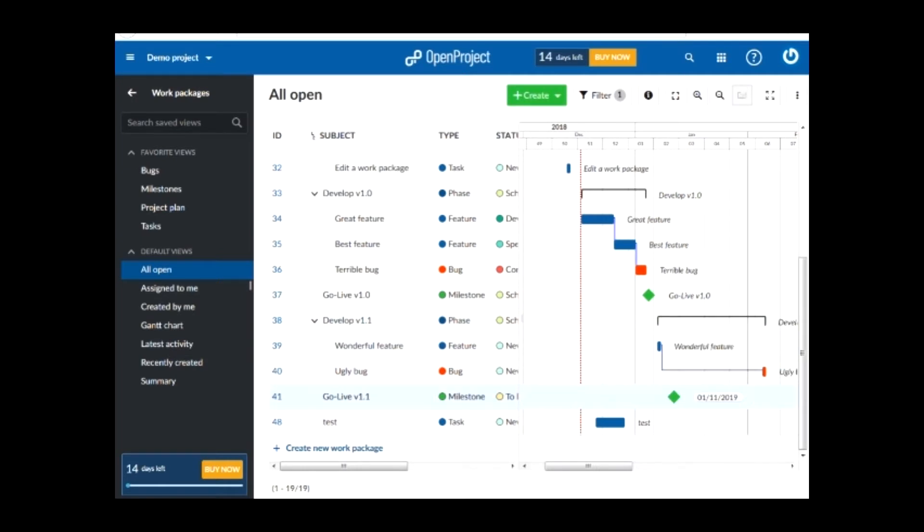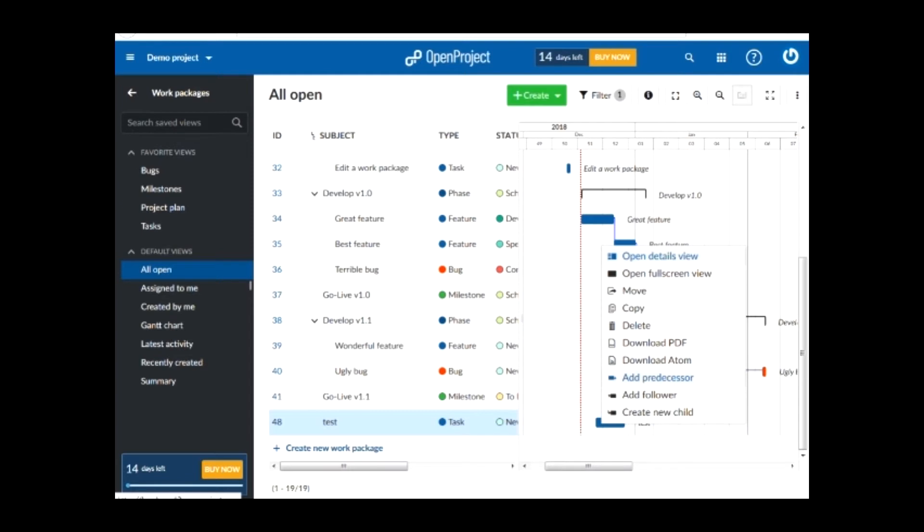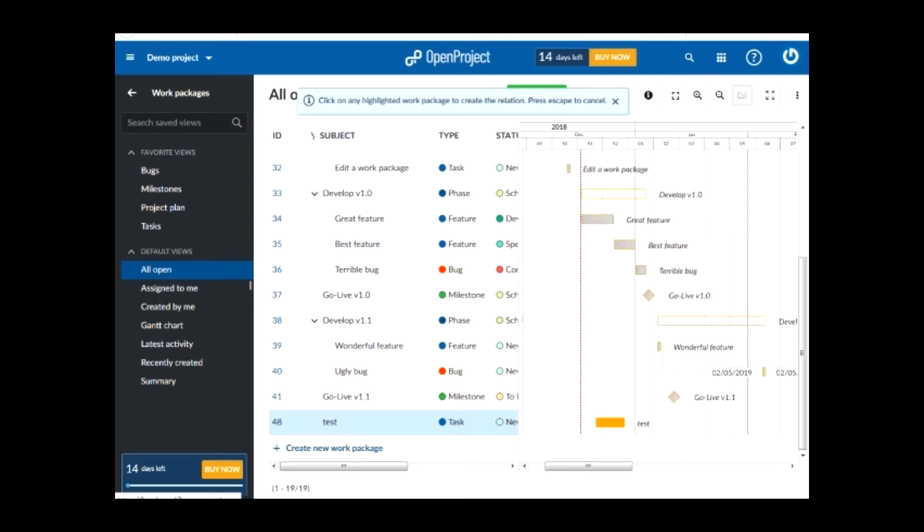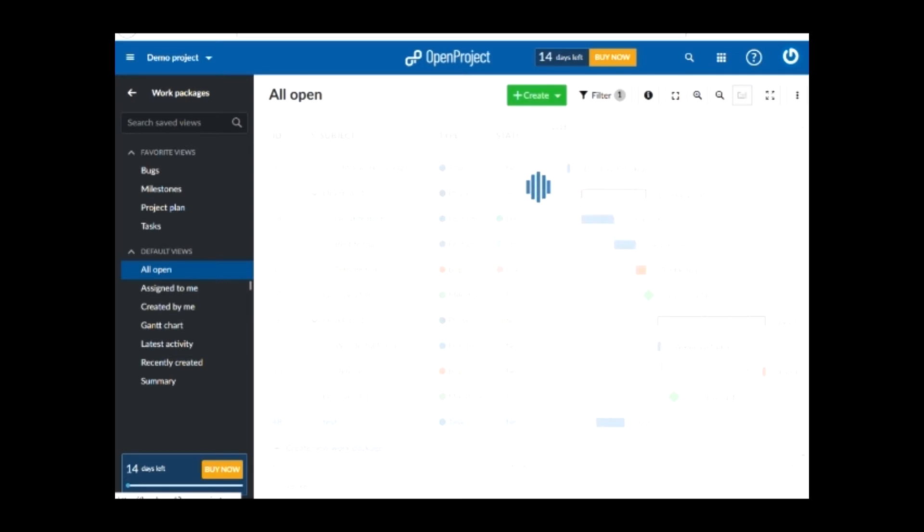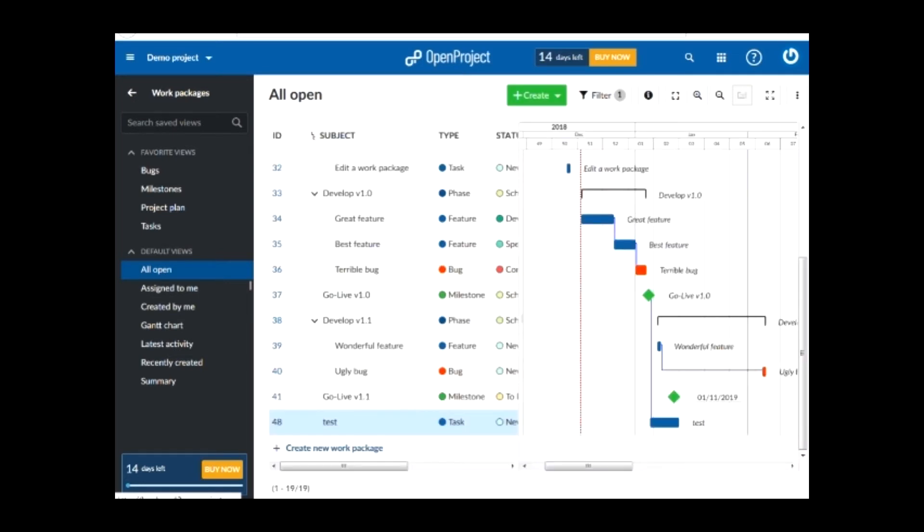Furthermore, you can create a relation by right clicking on the new task that we added and then clicking on add predecessor or follower. A predecessor is a task that as soon as it finishes, our task can start. A follower is a task that starts as soon as our task finishes.